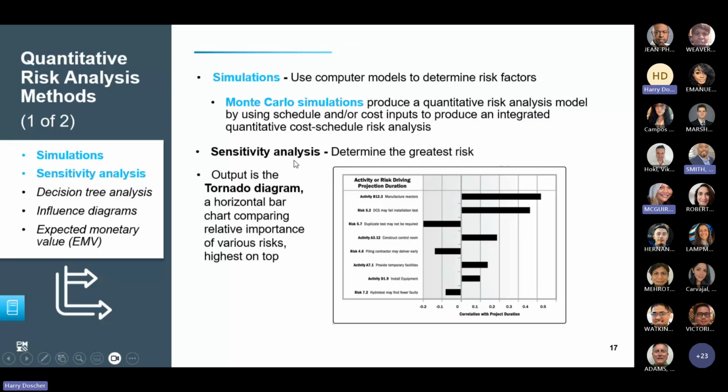You can do a sensitivity analysis, where you identify which risks will have the most impact on the project itself. Usually, if it's a risk, it's not an opportunity. What we're looking at could be one or the other or both of time delay or budget overrun.